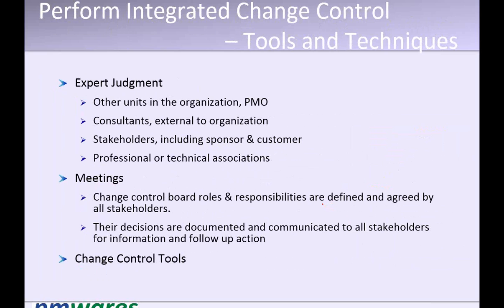So if you have a process in place, then when a customer changes something, you need not call a meeting. As we had this question in the beginning: if any change comes, we need not call a meeting. We know what is supposed to be done. We have to first qualify it, see if it is in line with the charter or not. If it is, take it ahead and do an impact analysis. Whomsoever is required for the impact analysis, call these people and do the impact analysis. And then submit it to the Change Control Board.